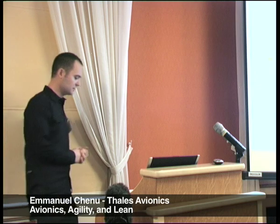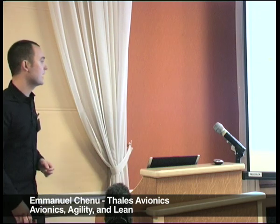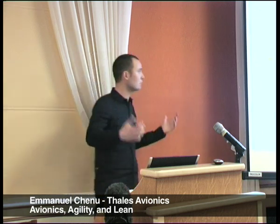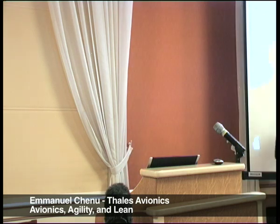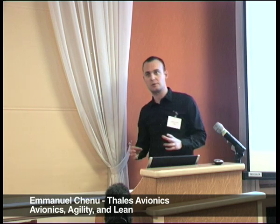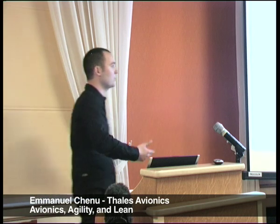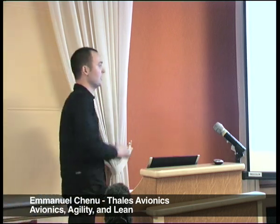We also create a continuous flow of information inside our team by co-locating the team in a common workspace. And we use visual control so no problems are hidden. Our workspace is loaded with information such as Kanban charts, which identify bottlenecks, burn down charts, which reveal progress, and blocking boards, which show the impediments. So, iterative and incremental development in short cycles with continuous integration is a short cycle process that creates a constant flow of finished work. And this constant flow brings problems to the surface. And then, to maintain the flow, you have to stop and fix the problems.